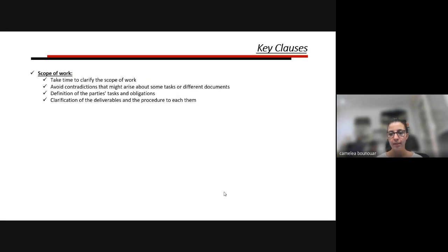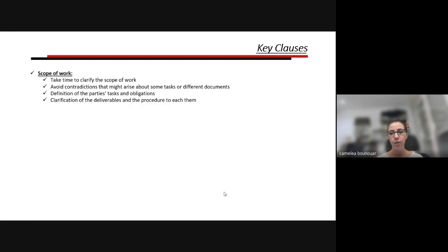Avoid contradictions. If definitions are not clear about who is doing what, you'll have discrepancy and contradiction — the contract will be full of inconsistencies. It goes to the definition of each party's tasks. In almost every project, it's not only one party performing everything. Each party has their own tasks. Be sure it's crystal clear who is doing what, not discovering mid-contract that one party says 'it's not for me, it's for you' — that means return to negotiation, lots of time, lots of money. Clarify all deliverables including KPIs and documentation.